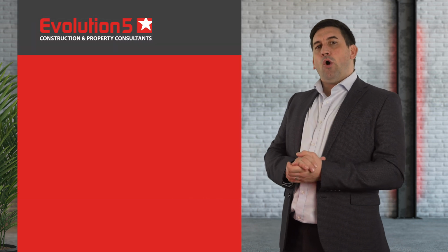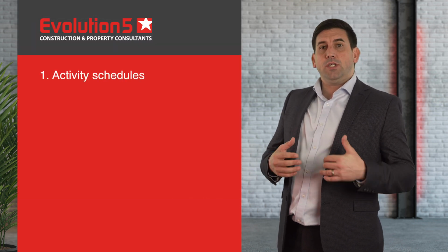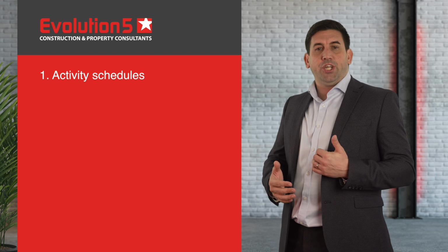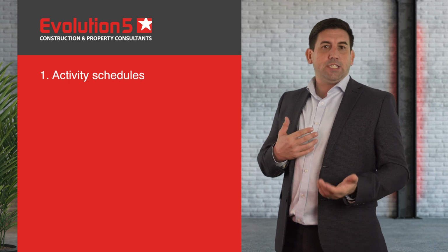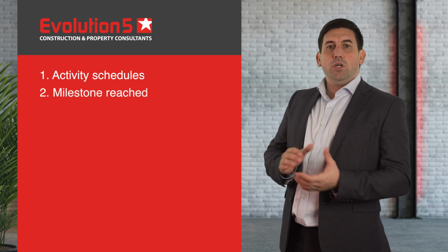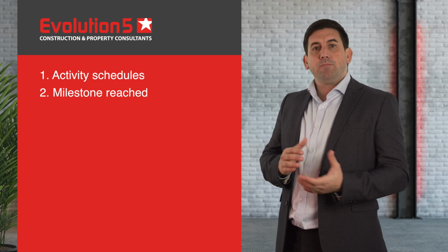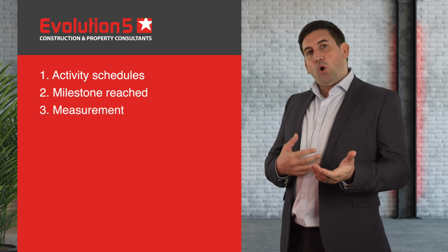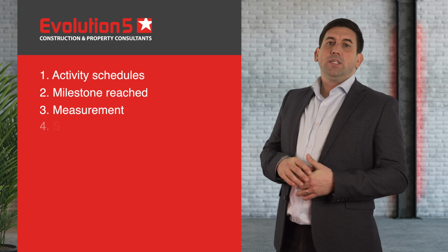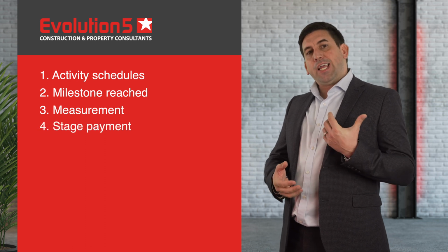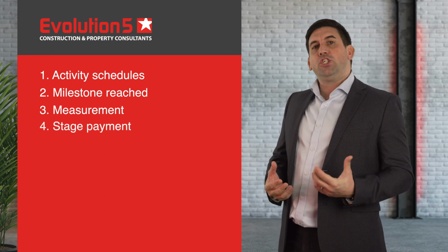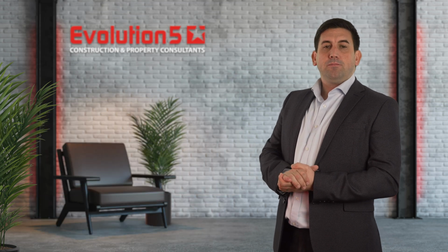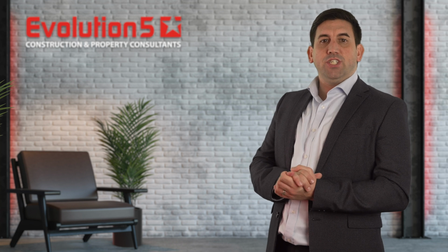Calculations can be assessed on activity schedules, assessed in terms of percentages achieved or completion of the activity, milestones that are reached on a pre-agreed programme, measurement against a bill of quantities, or stage payments against calendar dates, or a combination of all of the above. There are many ways for the quantity surveyor to present their valuation assessment.